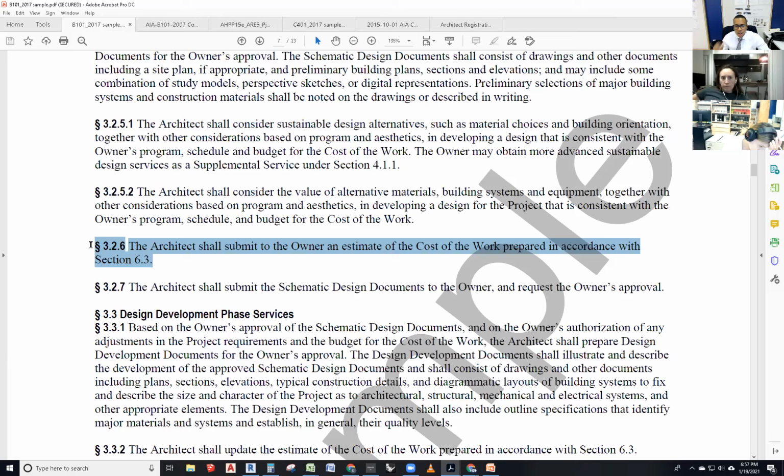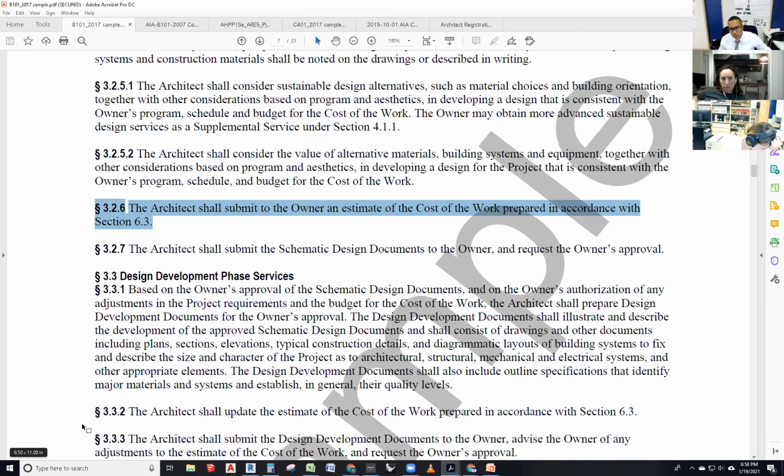All right. So we can mix precedent projects that we've used and a cost per square footage and find the middle line between those two, or we can hire a cost estimator and they'll figure out how to do it. But it will be a cost per square foot at this level.